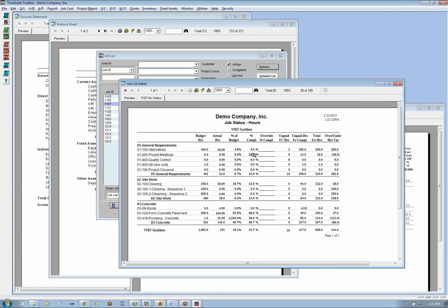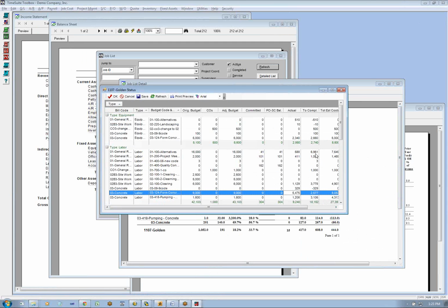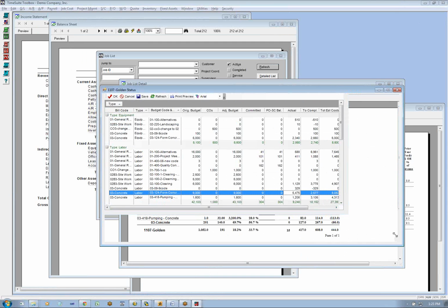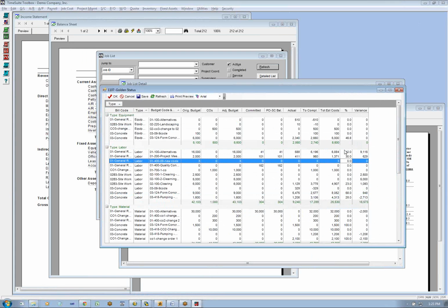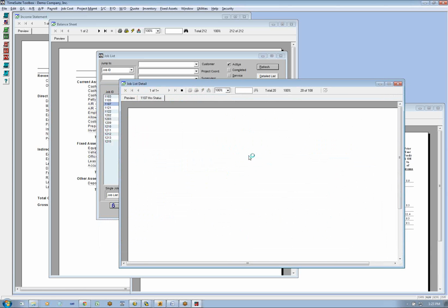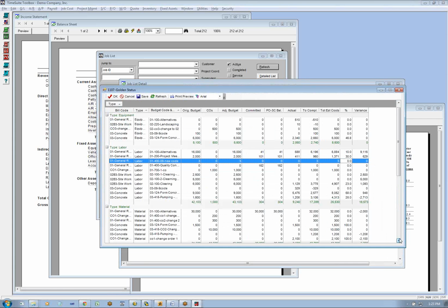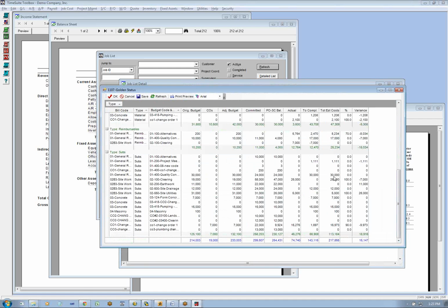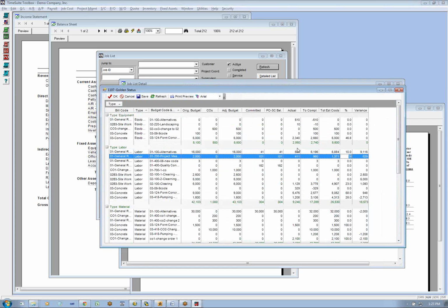So let's say they said it's 10 and 30% there. You would come over here to this, and you would say 10, 30. Hit save here. Come back over here, hit your lightning bolt. By the way, while that refreshes, it changed our estimated cost to complete. We'll change it by another 1,000, so you can see it's 216 is our total estimated cost, which includes the adjusted numbers because our field guys say they were 30% done on that labor.